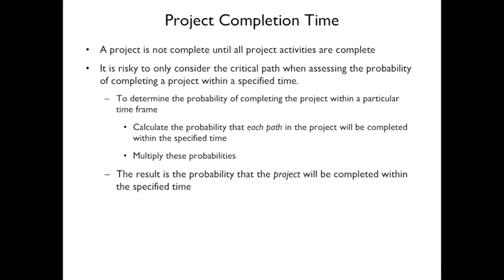A project is not complete until all project activities are complete, so it's risky to only consider the critical path — because if you focus only on it, something else gets delayed and becomes the critical path. To determine the probability of completing within a particular time frame, calculate the probability each path will be completed within the specified time and multiply these probabilities. The result is the overall probability the project will be completed in time.